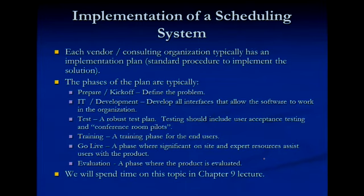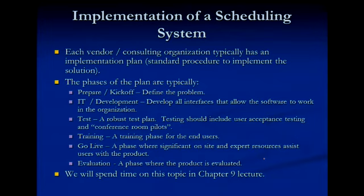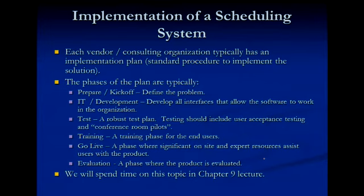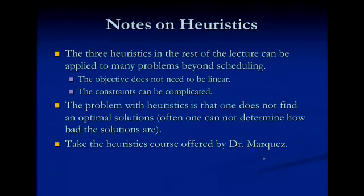If you're implementing one of these systems — any IT system, whether SAP or a scheduling system — you want to work with the vendor who sold you the system, and typically you do it in a series of organized steps. You have a prepare phase or kickoff phase where you define the problem. You have IT development work where they interface the software to work within the organization. You test it, and testing should include user acceptance where you do a conference room pilot, bring everybody in, show them how to use the system. You train them, go live, and then evaluate whether it worked.